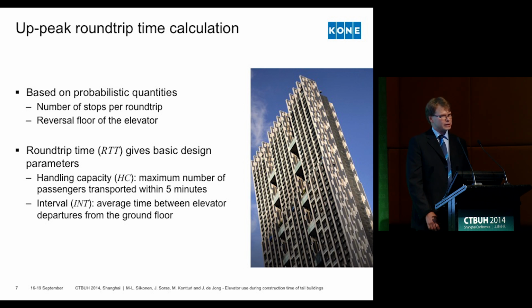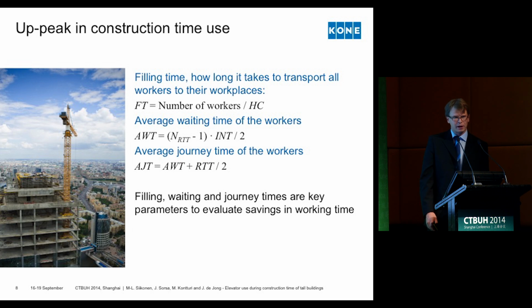These parameters are not so easy to use for construction site situations because there are other things that are of interest. Filling time is the time it takes to transport all the workers or passengers to their workplaces, and that is a more interesting parameter for construction site analysis.